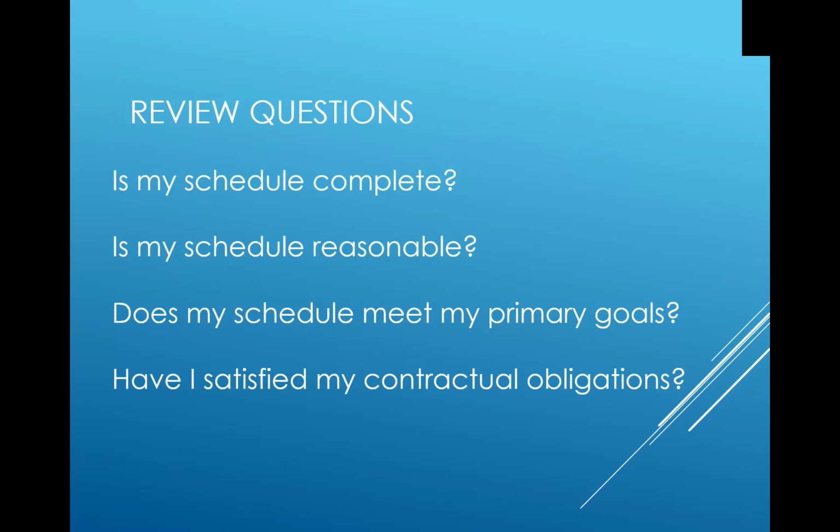Is my schedule reasonable? When you're finished with your schedule, you need to look at it and say, can I build this 5,000 square foot retail store in 90 days? Is that a reasonable time frame? Well, then you start looking at all your tasks and your durations, and you make sure that you've actually added up your time right. You've added your float, and you've added municipal inspections and that sort of thing. So you know that you've actually created a reasonable schedule.